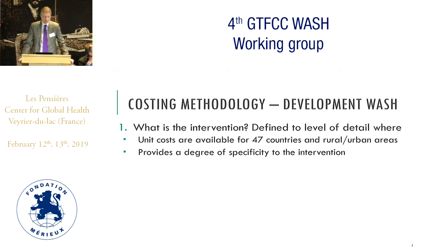So in order to do a costing, there are a few basic questions to answer. It's really not rocket science at all, so anyone can do this. So first, what is the intervention? The intervention needs to be defined to a level of detail where you can gather unit costs on the interventions. And for a global investment case, we needed the cost data to be readily available. We couldn't go out and collect a lot of information from primary sources.